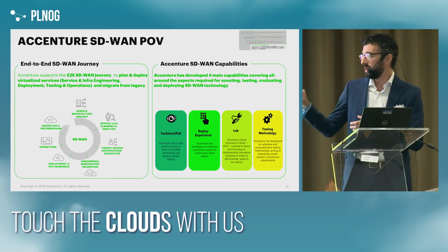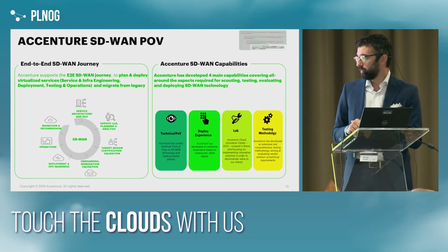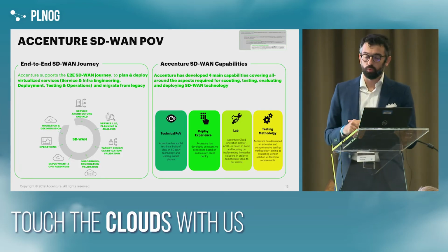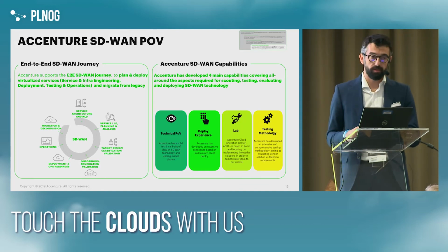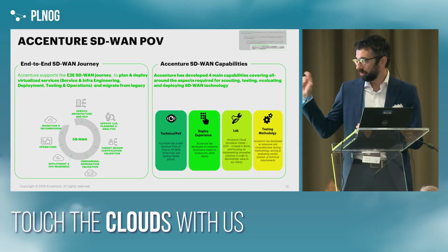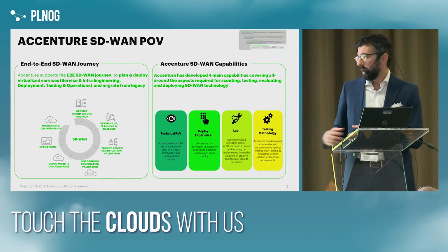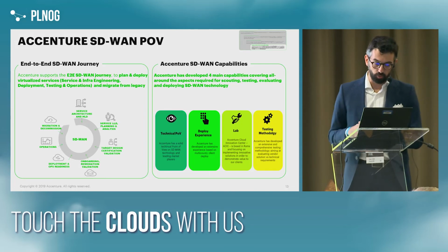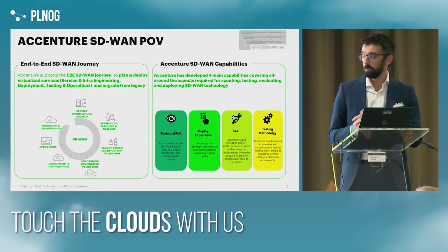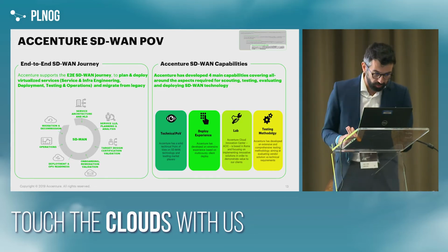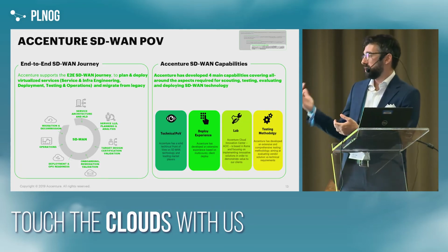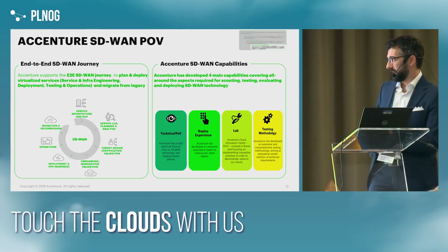Usually what will happen here is that we scout the solution over the market. We can also do proof of concept. We can do live proof of concept, also using real traffic, to convince our client that this is the right solution for them. We will do planning. We will do analysis. We will do the validation of these tests. Of course, we will start after that doing the onboarding part. We will accompany also the operation, so the handover part to the operation team, and the migration and decommissioning of what was legacy.